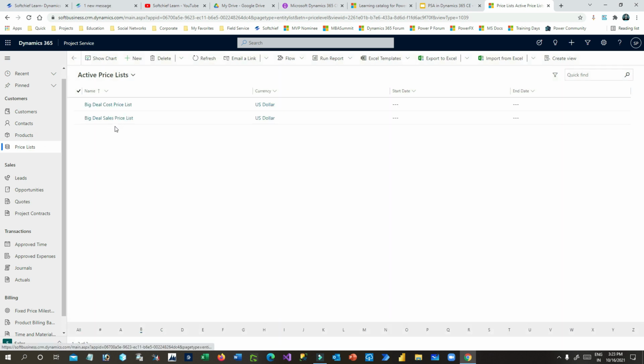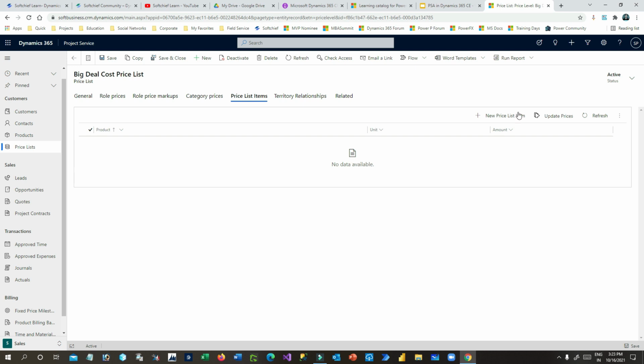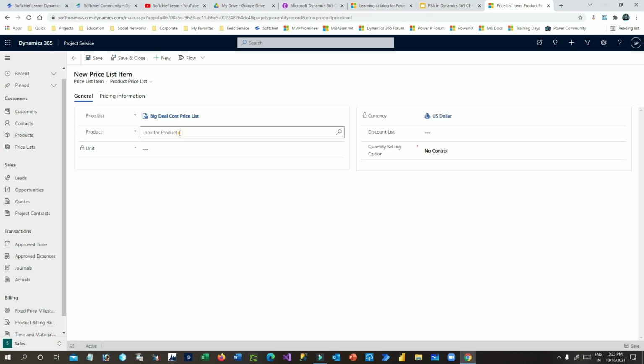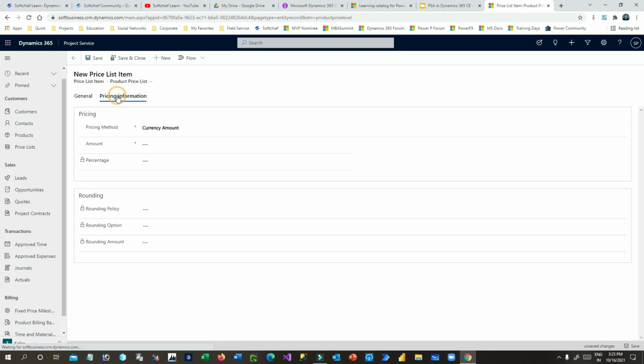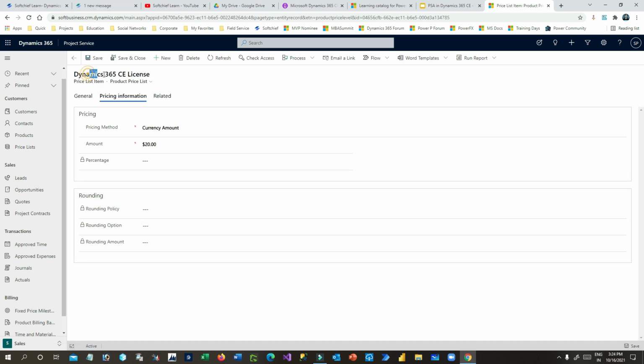So my price lists are two: big deal cost price list and sales price list. I will open the cost price list. And what is the cost of this? I want to define the cost price, so go to price list item, click on new price list item, and here I will define the product. This product I have created right now, and I'll go to price information and write down the amount. What is my amount? The amount is, let's say, $20, right? Now I can click on save. So I have defined that the cost of this Dynamics 365 per user license is $20, right?